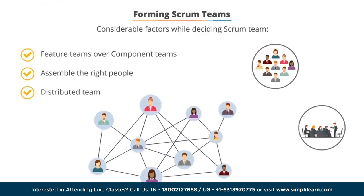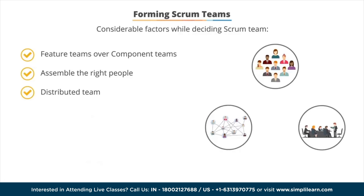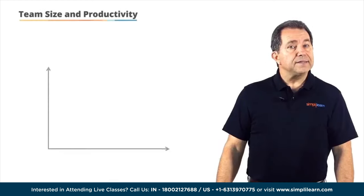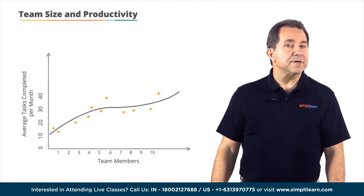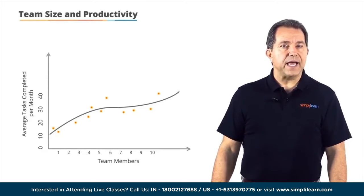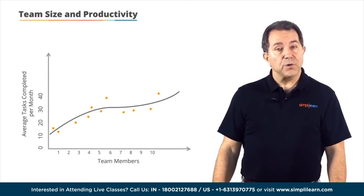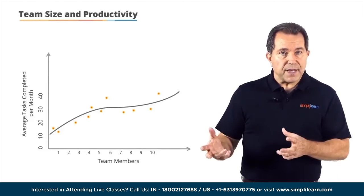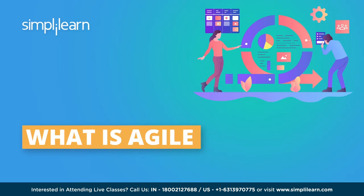Plotting team size and productivity will likely result in an S-curve — a team can be too small or too large. Remember the sweet spot is six plus or minus three.